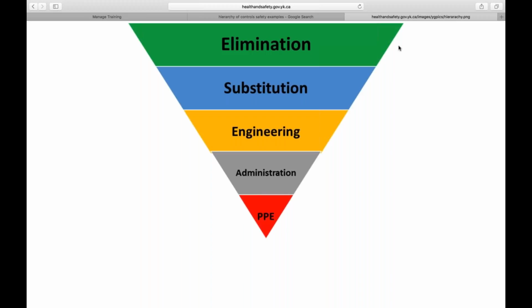And then pre-job safety planning should follow a certain format. First and foremost, step one, we absolutely have to identify the hazards. Then we have to evaluate the consequences that we may be exposed to, or how bad the hazards could be. Then we rank the hazards by risk and calculate our risk, and then ultimately control and minimize our prioritized hazards. So we're going to prioritize them by necessity.